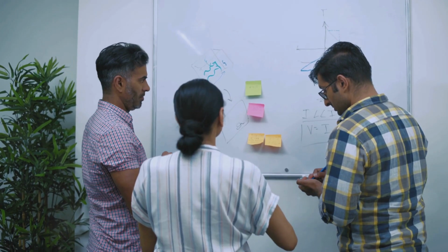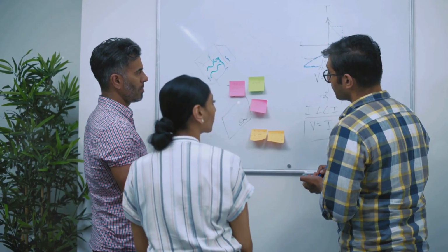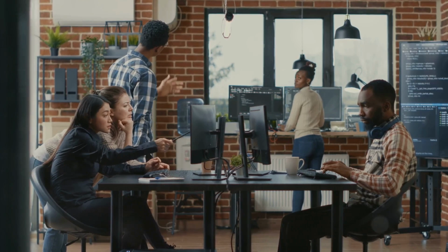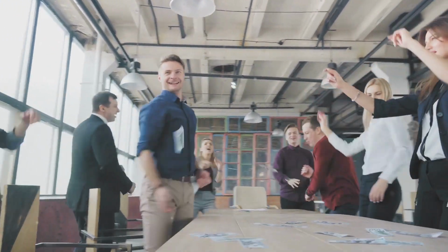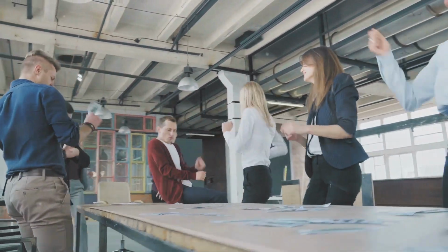Sprint planning. PBIs at the top of the backlog are selected for a sprint, provided they meet the definition of ready, or DOR. Development: the Scrum team works on the PBI during the sprint. Acceptance: upon meeting the definition of done, or DOD, and passing acceptance criteria, the item is marked as complete.